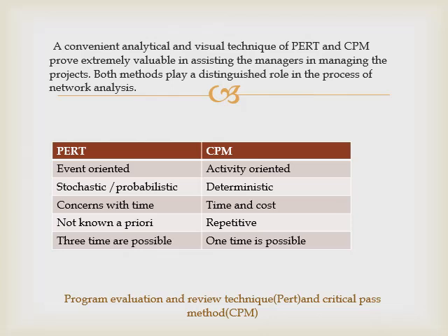PERT is normally used for projects involving activities of a non-repetitive nature, in which time estimates are uncertain. It is suitable for new projects.